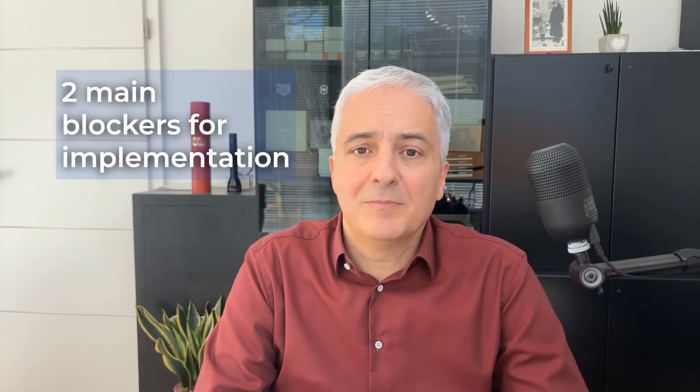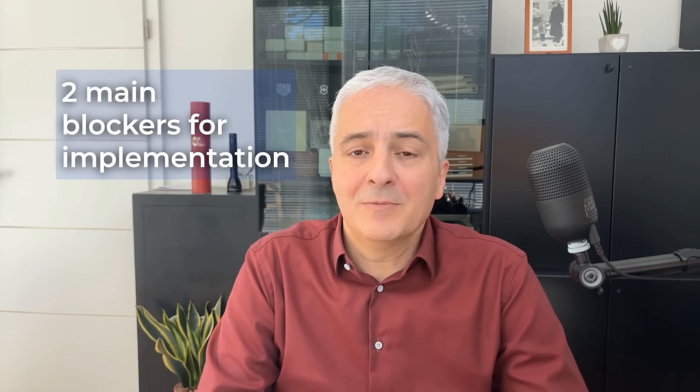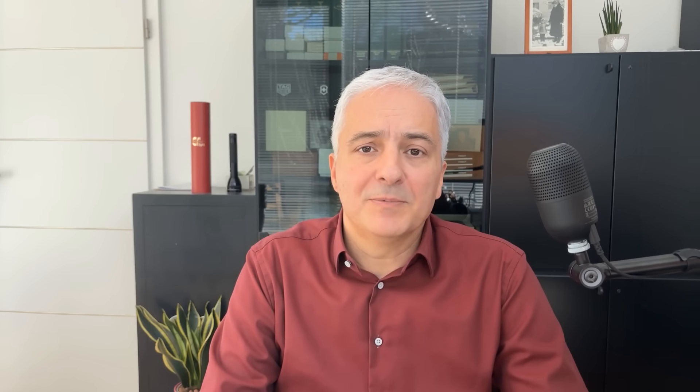If you wonder why would you have to fill out resources and training and awareness for each of these implementation steps, basically this is because from our experience these two things are the biggest blockers when implementing the standard. Usually you cannot perform a certain step either because you don't have enough people or money to implement them, or people that actually have to do something do not know how to do it. So when you actually define these things upfront, then it becomes easier for you to implement each of these steps.